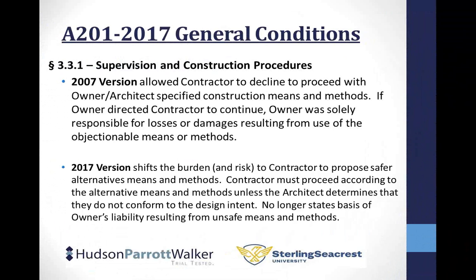Different provision, but I think it's 1210, somewhere around there, where it talks about you have no design responsibility, which is in the standard 207. It's also in the 217. But if you read that provision, there's language in there that needs to be taken out. The language says in this provision, apologize for not recalling exactly, that you're only responsible for design to the extent it's specified in plans and specifications. It goes on to say, or unless such design would be necessary for you to carry out your work. It is that language that I strike out of every contract because that has no parameters about what it means. If they want you to take on the design responsibility and they want you to take on the performance responsibility, there's a cost to that and there's a process for that. Not this provision. Anything else?